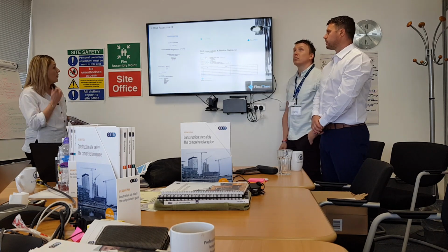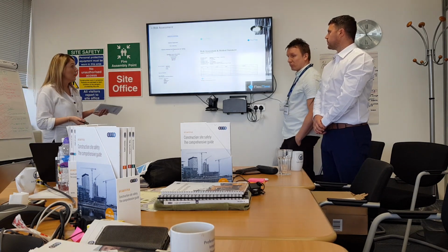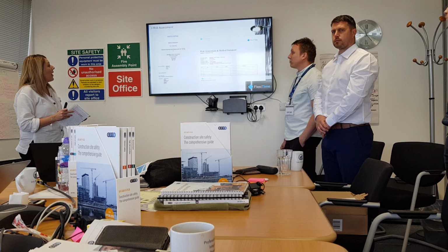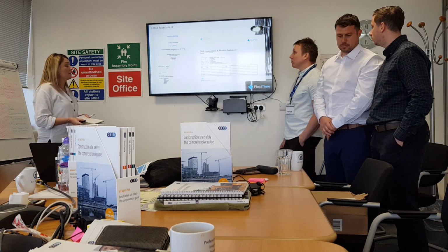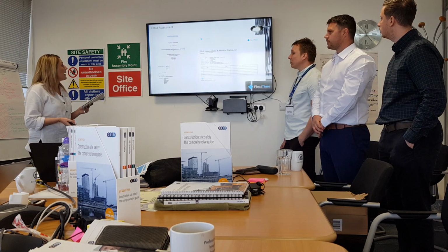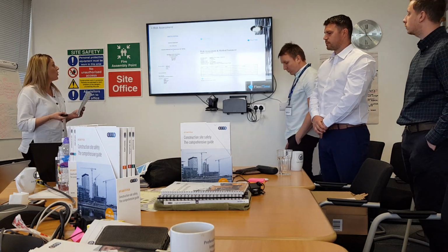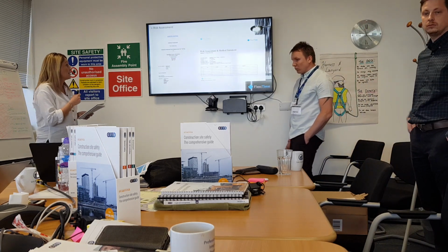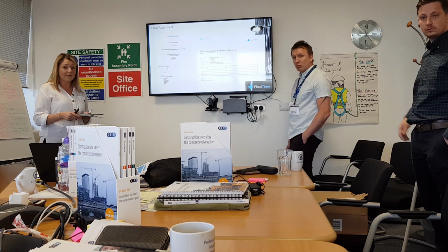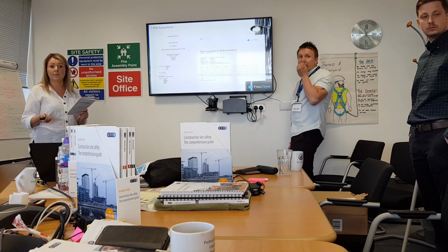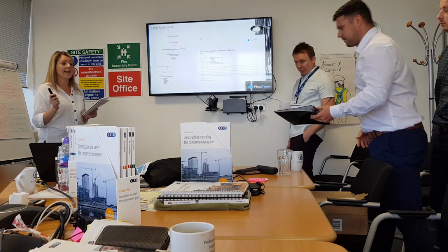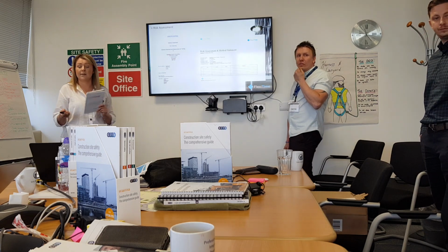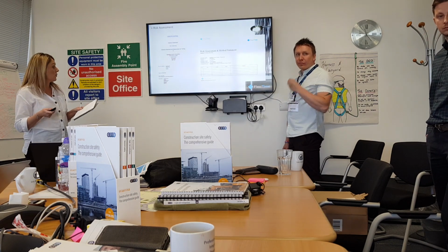We have put together the risk assessments and method statements for phase 1, which is the renovation of car park area 1. We have identified that the asbestos removal needs to be conducted by a licensed contractor. Due to this, we have sourced local contractors, called ACM Disposal. They have supplied copies of their risk assessments and method statements also. We have sent these across to your health and safety team for them to review. We have put together a site pack which contains full copies of the risk assessments, method statements and some further information which will be discussed later through the presentation.